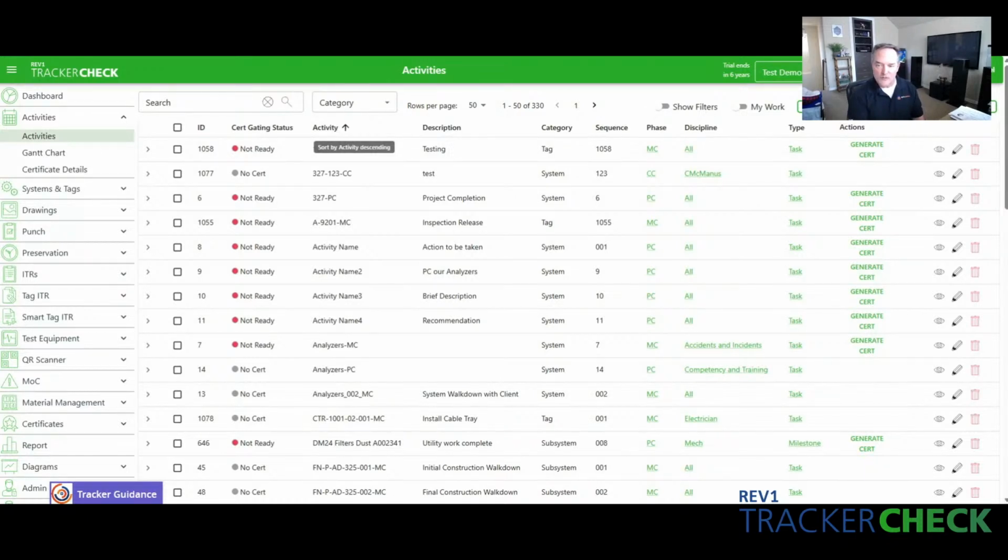What that does for you is you're pulling in the scheduled dates now, start and stop dates. You also have the activity in our system, so if we're tying it to data, like the ITRs or associating with a cert, we can backfeed the scheduler when that's complete.